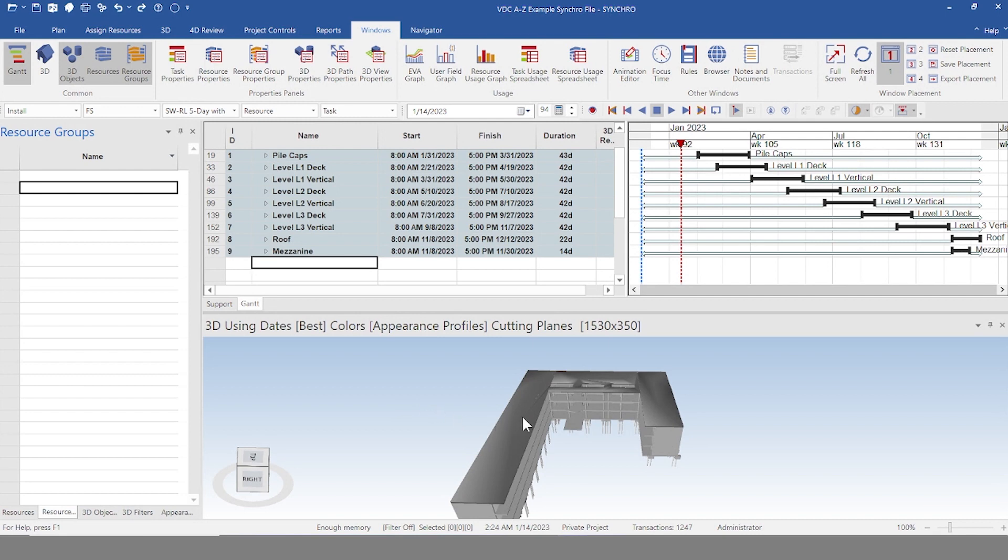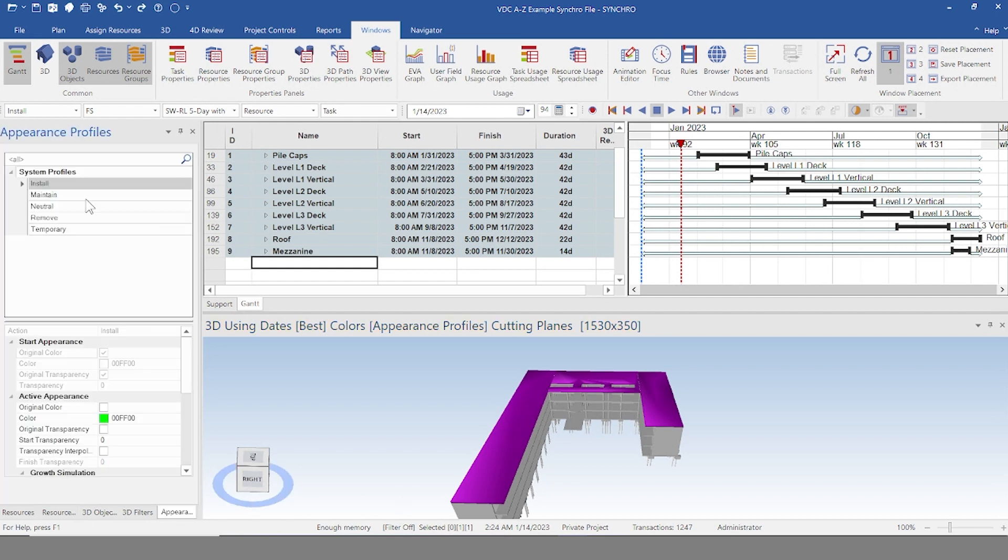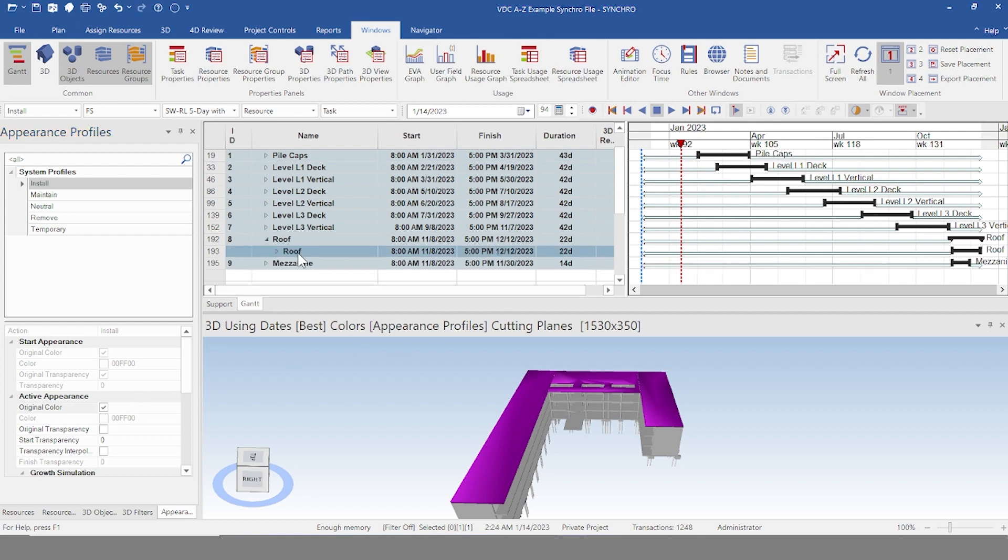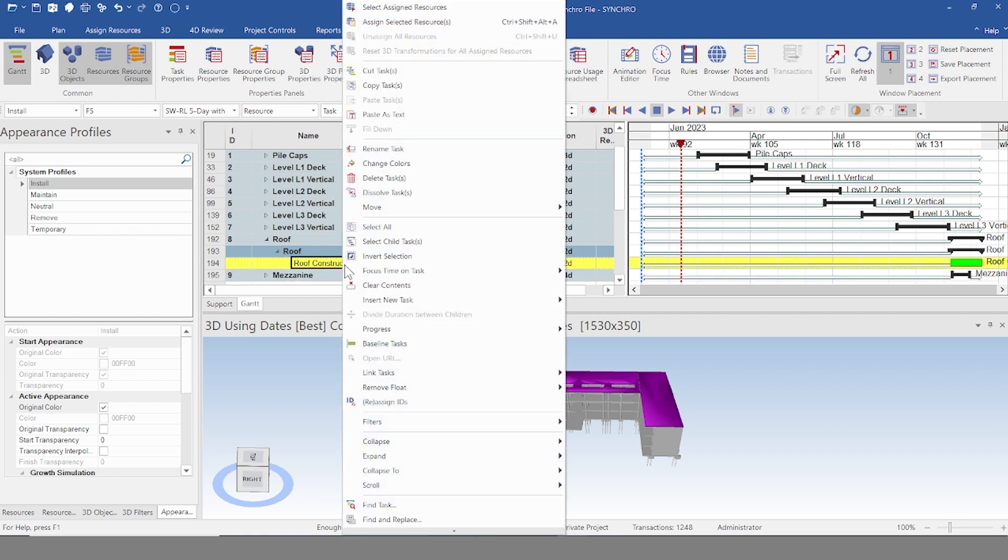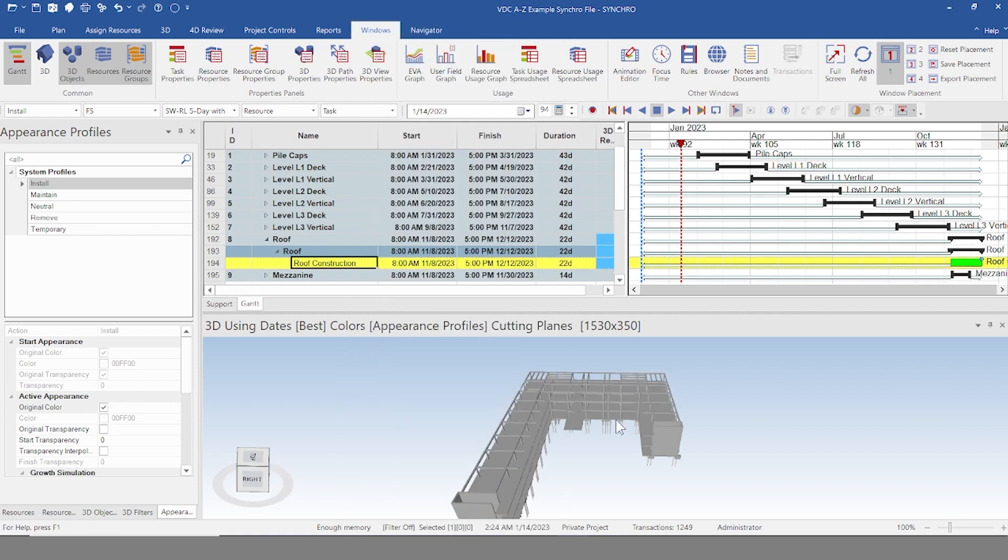So to start assigning, say I want to assign this roof here. It's typically best practice to move from the top down. The reason for that is if I assign this, I'm going to go ahead and make sure my appearance is on install. You'll see why in a moment. I'll keep it on original color. And I'm going to assign this roof to my roof task. I'm going to right click and then assign selected resource. So it disappears here.